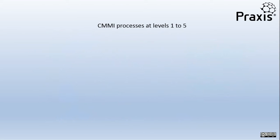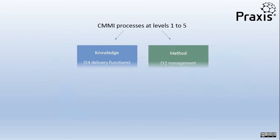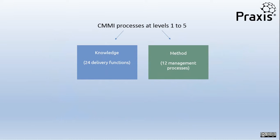In the CMMI model, lower level processes are more specific and higher level processes are broader and more integrative. Praxis contains a body of knowledge made up of functions covering specific areas such as stakeholder management or risk management, and also a method based on lifecycle processes that broadly utilize and integrate knowledge functions. So the Praxis model adapts the CMMI approach by using the functions to measure capability and the lifecycle processes to measure maturity.